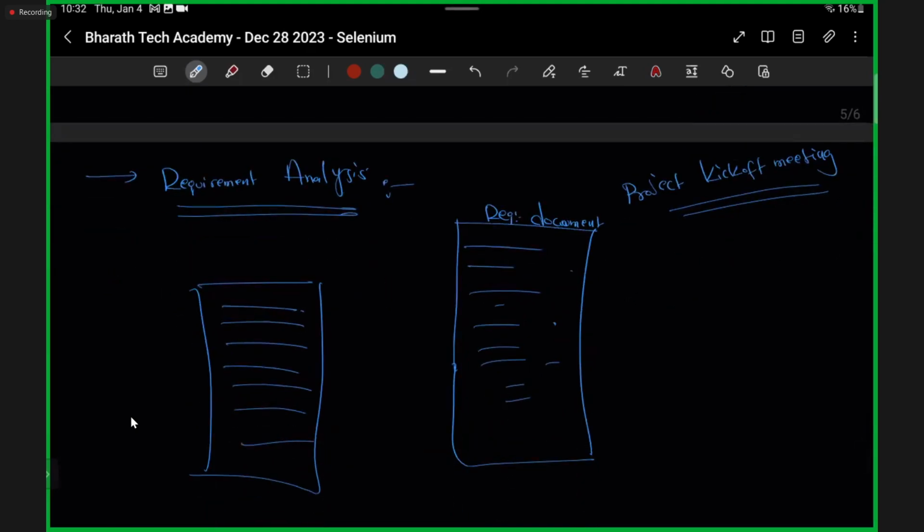now each and every team member knows about this particular project. They have asked so many questions and clarifications. Now it's the business analyst's responsibility to clear all those, and to negotiate all those things with our client also. If the client agrees with the negotiations that we are going to ask for, or if our project team agrees with whatever the client is requesting, then only we are going to proceed further in terms of software development. Until then, we are going to hold the project here only.